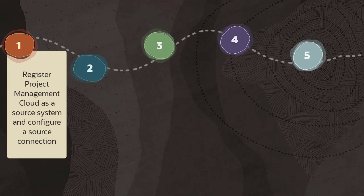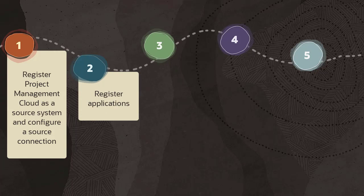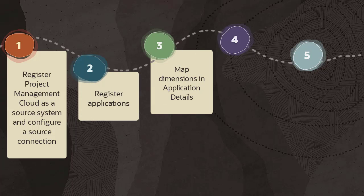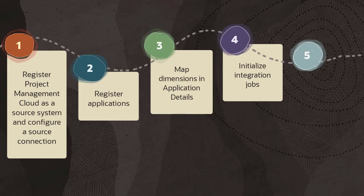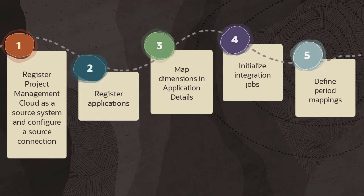First, register Project Management as a source system and configure a source connection. Second, register applications. Third, map dimensions and application details. Fourth, initialize integration jobs used to push data. And fifth, define period mappings. You configure source systems and define period mappings in Data Management. All other tasks are completed in Data Integration.